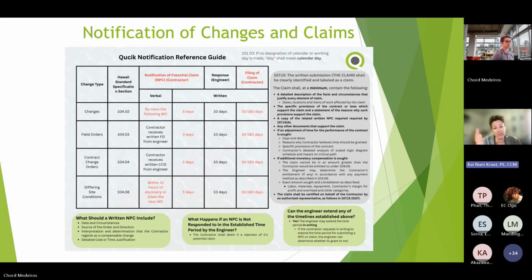and that's why I know different people have different ways of approaching it in your correspondence, but anytime you're providing some kind of field order, direction, whatever, adding that, please refer to notification requirements in 104, with respect to blah, blah, blah. If there's anything here that you construe as a change, please follow notification requirements. So within, what is it, 5 days, 3 to 5 days, you should know whether they think it's a change.